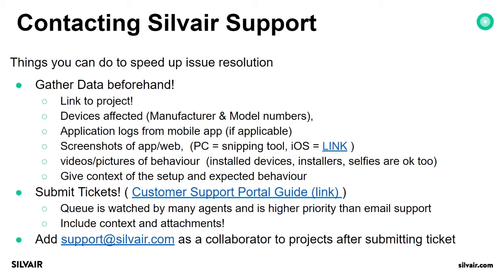Right now, we see that the most problematic installation types are outdoor installations, especially when the environment is changing during the winter season. For example, if you commission an installation when there are no leaves on the trees around, the connectivity may be better than, for example, in summer when all the trees are covered with leaves.